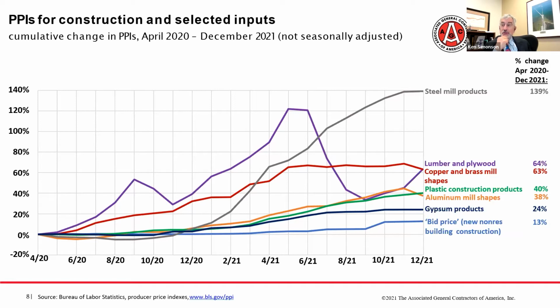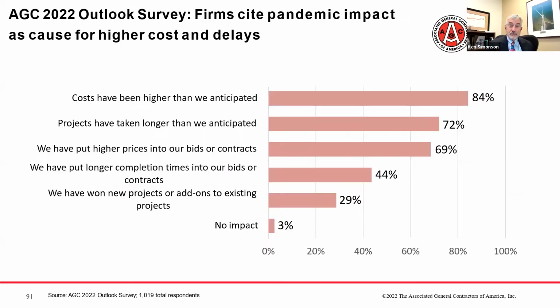And that can be as dangerous in its way as a straight upward trend where a contractor knows they have to put in a contingency for further price increases. Now they may bet that the price increases are over, and if they just bid it at current prices, they'll be able to be winners in a few months, and then they get caught on the other side of that bet. So it is still a hazardous time.